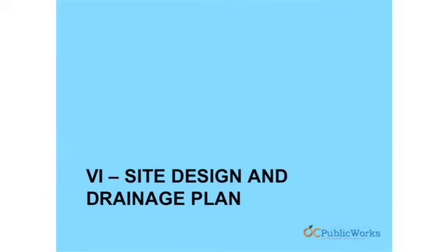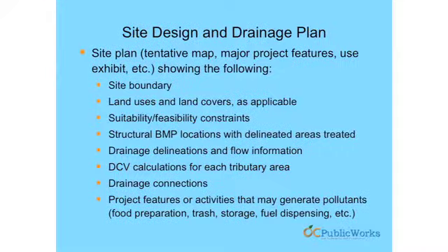Section 6 is essentially a map, and the best practice for this map is generally to show it over the same base as the project site plans, so that you can assure that everything's to scale. You can do area takeoffs as needed to make sure that they've sized things accordingly and so on. It has a number of things that it needs to show.